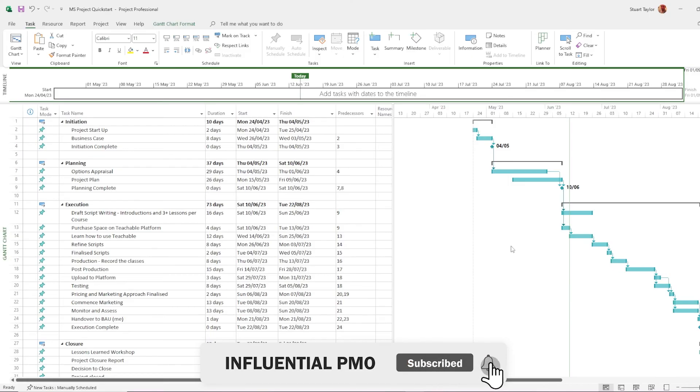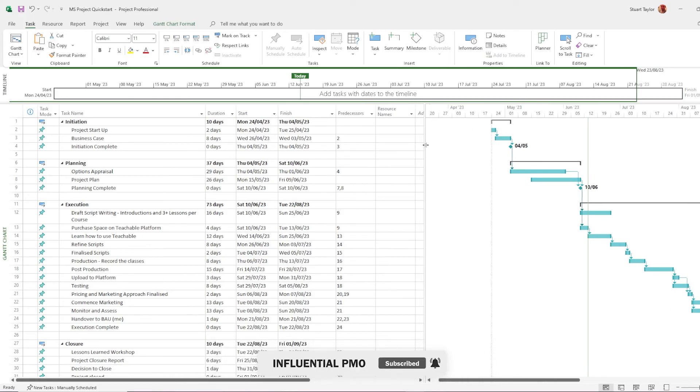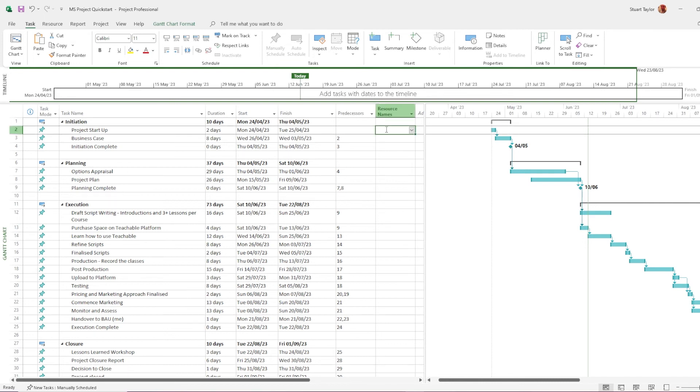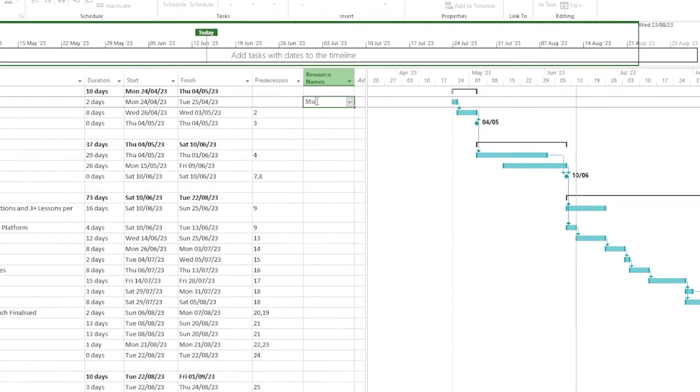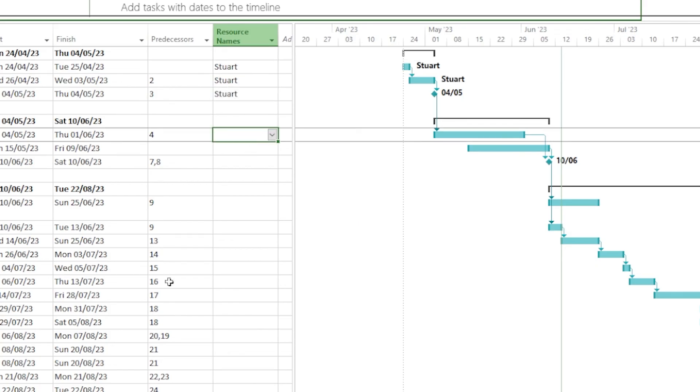You'll notice we have a column called resource names. In the case of this project, there's only one person working on it. So this is going to be nice and simple for me. You'll see my name appearing next to the tasks over on the right hand side as I add them. You'll see the project allows you to drag and copy. Have you noticed the little red people that have appeared over on the left hand side there? That's another advantage that the project has over Excel. This is showing where a resource is overbooked.